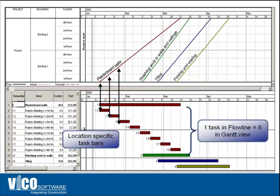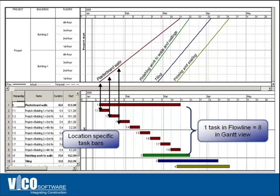In a Gantt chart view for every single location in an activity-based schedule, you'd have to create a task and activity. In this case you have plastering for drywall on the first floor, second floor, etc. up to the eighth floor. Every single activity of drywall for each location is a different bar in the Gantt chart view.